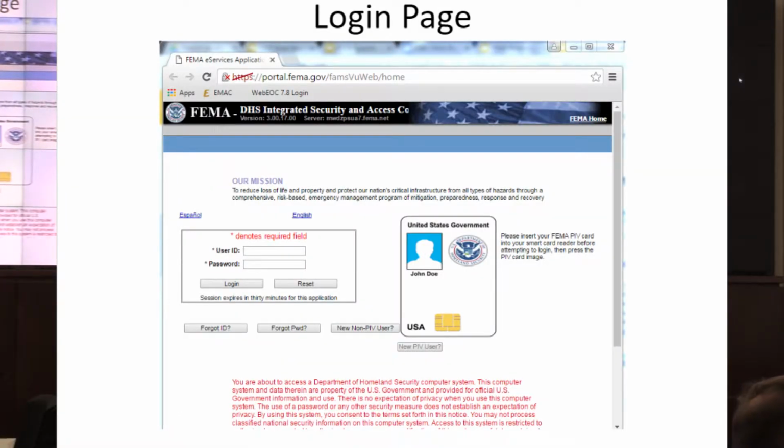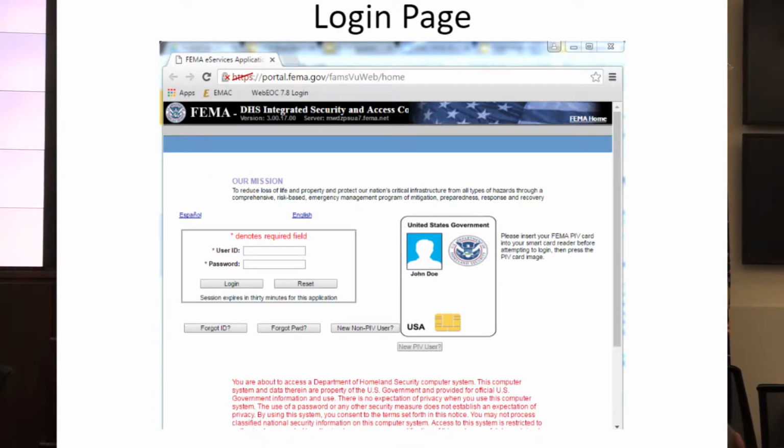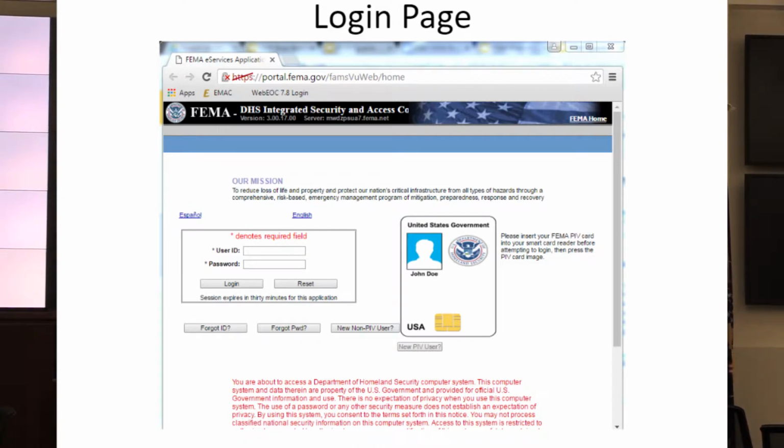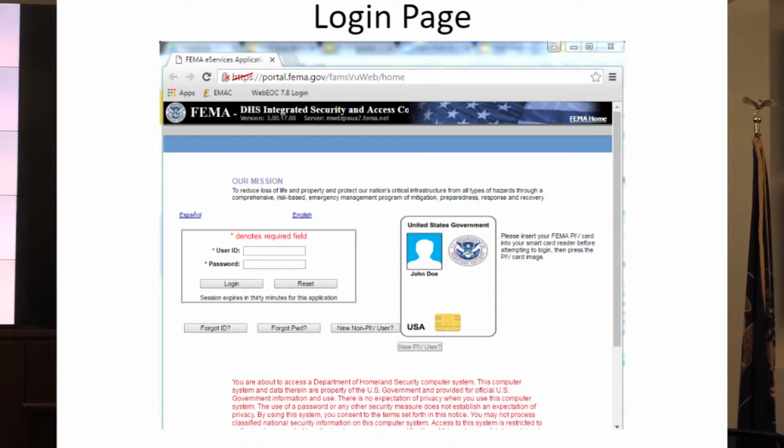Sorry, Jenna. Go ahead. So we will say the community should get access to it, because we've had situations where people had their engineering firm get access to it for the grant, and then they ended up changing engineering firms between when they did the application and the project, and then nobody could get onto the program to edit stuff or see what the grant was. So just make sure, you can potentially share information, then change the passwords and stuff like that later, but make sure that the community that's the applicant is the one who has the access and is inputting the information.